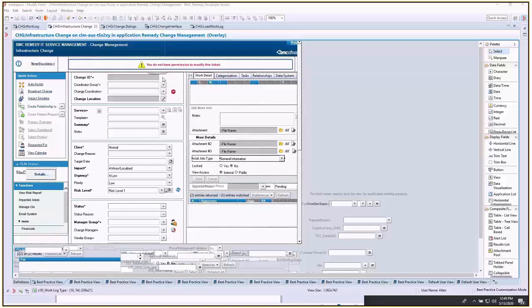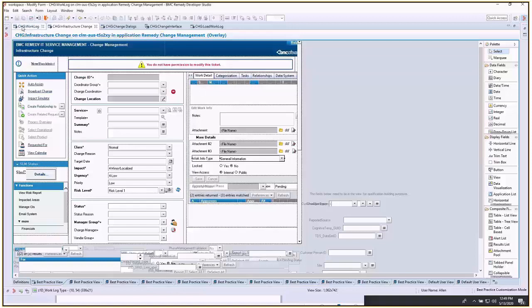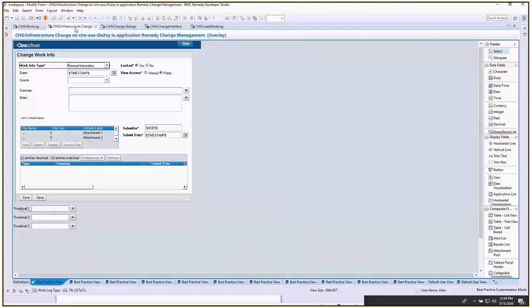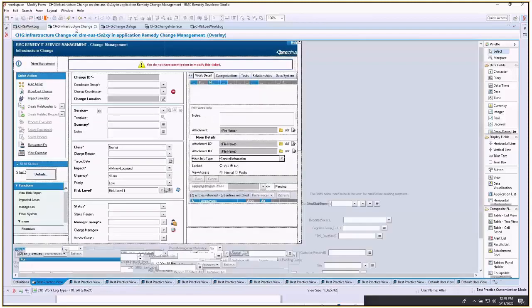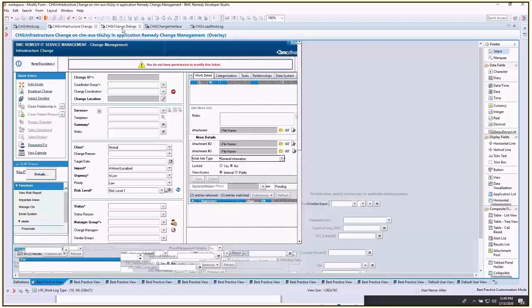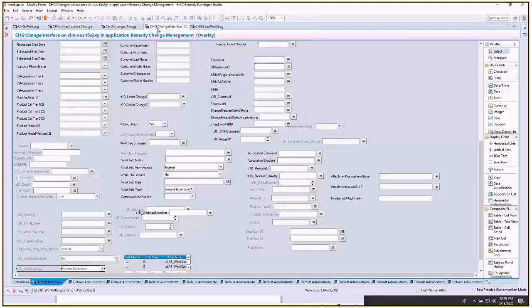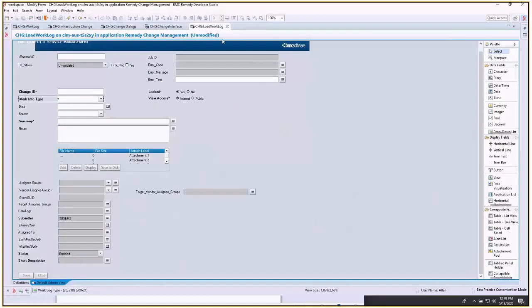You're going to need to do this on five forms total: change work log form, change infrastructure change, change change dialogues, change change interface, and change load work log.